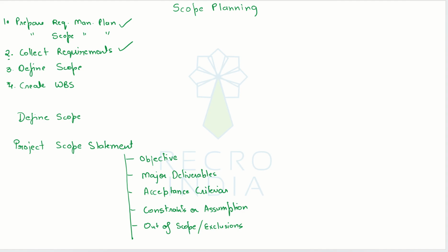Why is it important? Remember that scope is a boundary. Now, it's not really a boundary, like you can't see it or feel it. So you have to basically make an understanding of what's in scope and what's out of scope. If you have defined what's in scope, you have just done half the work. Until you define what's out of scope, you cannot really create that boundary.